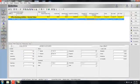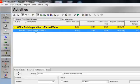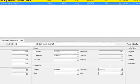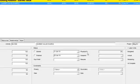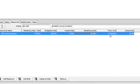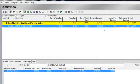Before we proceed, I'm going to turn off hint help. We're tracking one activity — let's look at the details. On the status tab, I can see this activity has an original duration of 10 days. It has not been actualized yet; its calculated start date is January 11 and finish date is January 22. The method for reporting progress is physical percent complete. On the resources tab, one resource is assigned to work 8 hours per day over the 10-day period — 80 budgeted units times $100 per hour — giving us an $8,000 budget at completion.